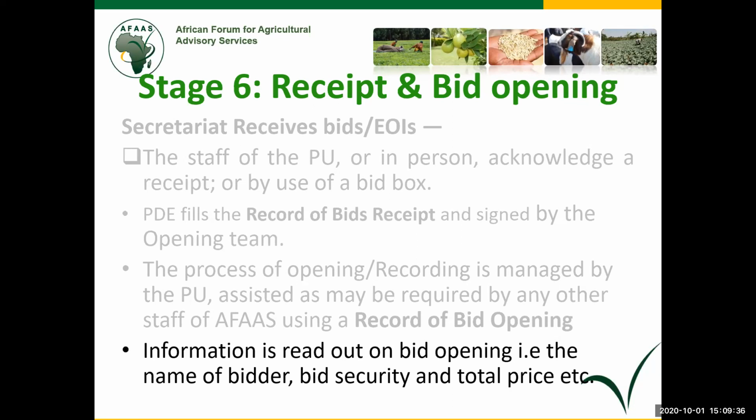However, looking at the methodology we are using, which is shopping, individual consultant selection, consultant qualification selection, the lower levels of the methodologies, we do not read these out. Reason, because in those methodologies, you are not compelled to. The language is, they may be in attendance. We can't call people to come and attend a bid opening of $1,000 and they put in 200,000 to go and look for, just to go for bid opening. So it's illogical. That's why low value procurements, we don't read out.